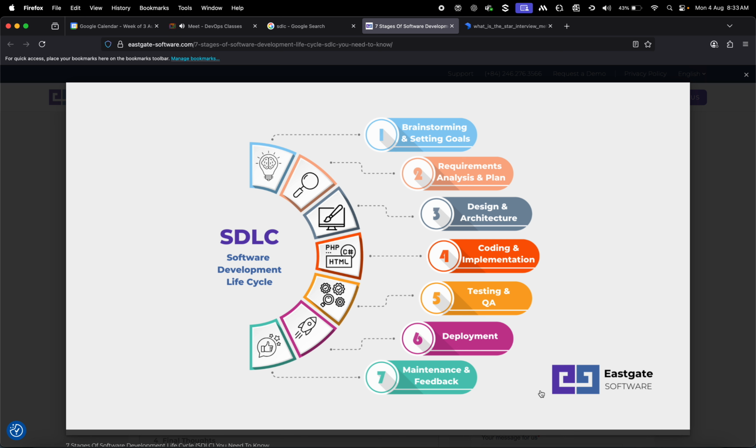So the waterfall method takes too much time to release any application because, as I told you, it's one after the other. Development takes 6 months, which means only after 6 months will they start testing. After the full application is ready, they start testing. I just said 2 months for testing, but it may take 5 or 6 months. See, 1 year over here. Again, deployment. So, lots of waiting time here.